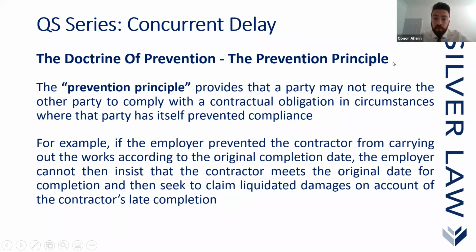That's the position, and you can see that it makes a lot of sense, because if an employer delays the contractor, be it deliberate or otherwise, then it cannot be right that the employer can instruct the contractor to accelerate as long as they pre-agree costs, but can't instruct him to complete by the original date, because it's no longer possible due to the employer's delay, and also then that he should be prevented from recovering damages, because that's the employer benefiting from the breach that he has caused to the contractor. So that's the prevention principle.